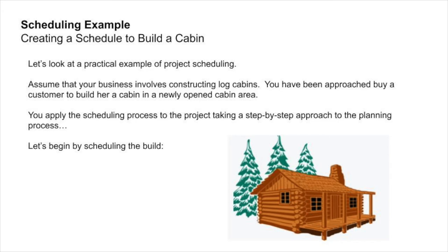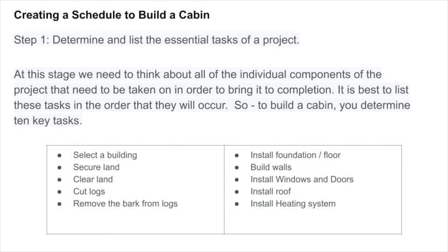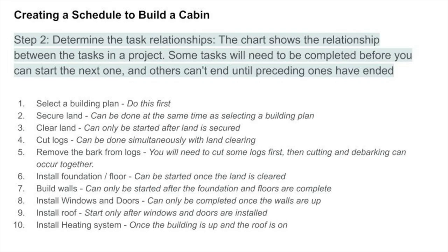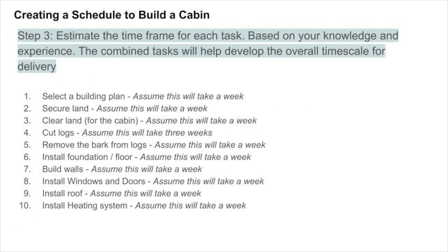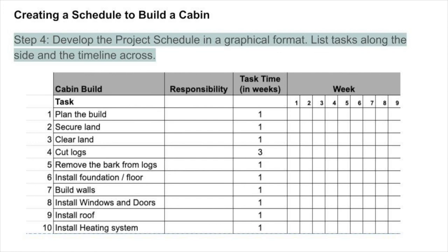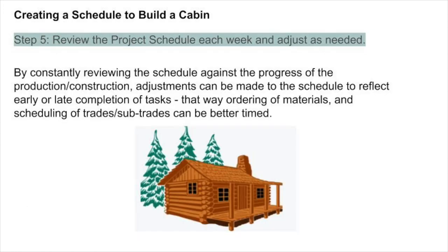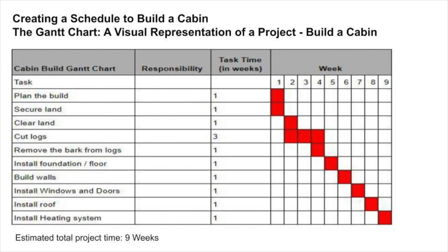What I've outlined here are the basic steps of the Gantt chart: determine the list of essential tasks for the project; then determine the task relationships — can they be done at the same time as other tasks or are they sequential; estimate the time frame for each task; the total combination of all tasks is your total timescale for your project; develop a project schedule in a graphical format; and review the schedule each week. There's nothing to prevent this schedule from changing as you move along. For example, if it rained the whole week you're supposed to remove bark from the logs, your whole schedule gets shoved back one week. So instead of taking nine weeks to build a cabin, it's going to take ten. You can reevaluate the schedule to see if you're on schedule, off schedule, or what a revised schedule will be.